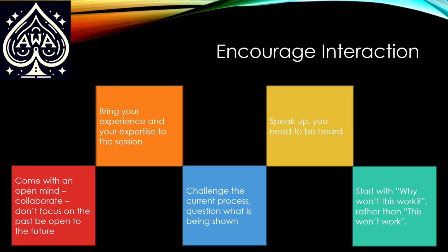And, as Lee said, I have a different way of doing this, but there are ramifications if you're not paying attention. And one of mine is in my projects, you have to grade these scenarios. Red, green, yellow. It didn't work, and why didn't it work? What's it going to take to make it work? Yellow, it kind of worked, but it needs to be tweaked. Okay, what does have to be tweaked? Or if it's green, it's good. When I do these sessions, if I show a process and it's green, I don't revisit that process until the end. And you, Mr. Customer, do not get to change that back to yellow or red without explaining why.